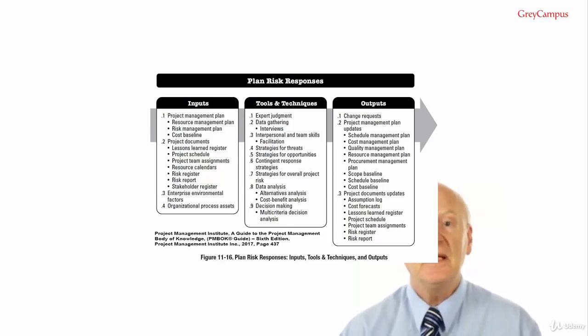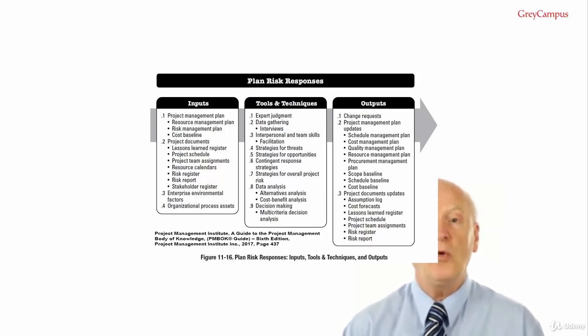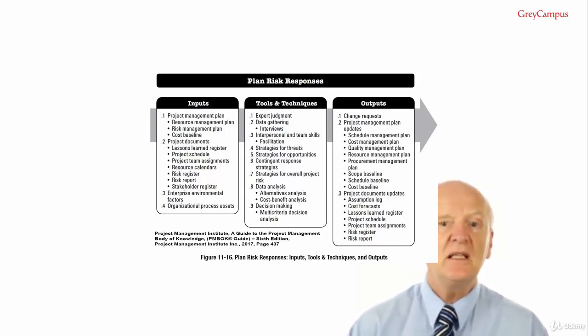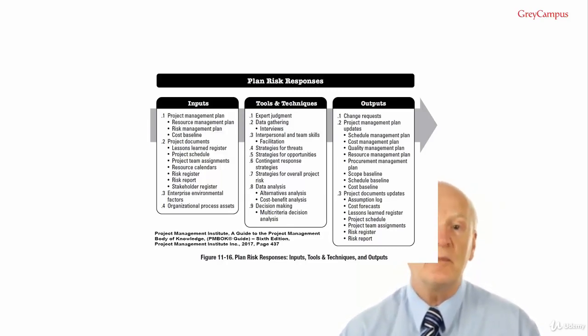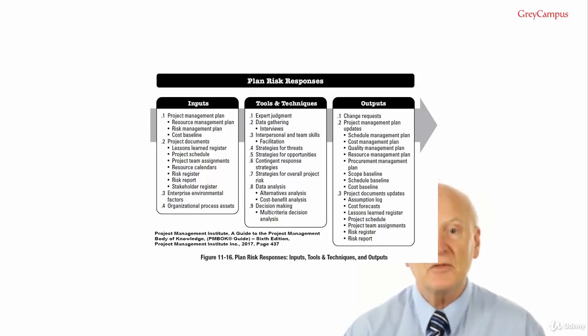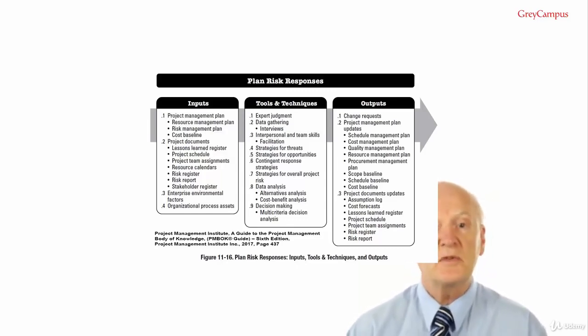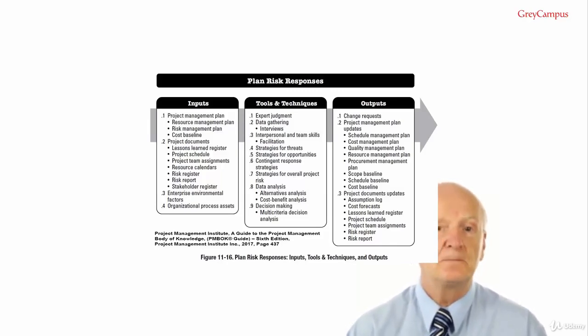Please note for the exam, in previous years, a popular question was similar to: which risk response is common to both opportunities and threats? The answer was the accept response. But with the 6th edition of the PMBOK Guide, the newly added escalate response is common to both as well. And so you may get a question on the exam asking which responses are common to both the positive and negative risks, which are escalate and accept.